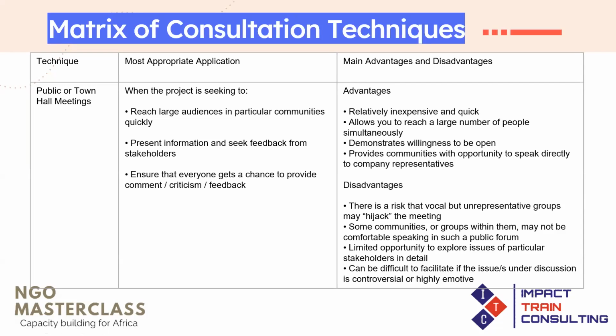Now, what are the advantages and disadvantages of using town hall meetings for consultation? The advantage is that, one, they are relatively inexpensive and quick. They allow you to reach a large number of people simultaneously. They demonstrate willingness for you as an organization to be open, and they provide communities with an opportunity to speak directly with CSO representatives.